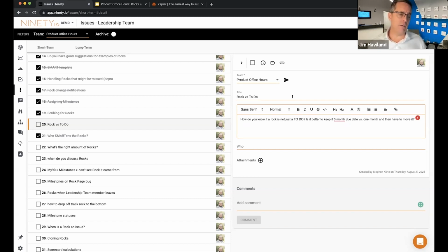So default to a rock if you think it might take too much time, and just mark it done early, and enjoy the rest of your quarter, or take on another small rock. You can take on more rocks during the quarter. I guess we never talked about that, but we do that all the time. We call them mini rocks, not 13-week rocks. If it's going to take more than 2 weeks, it's a mini rock. Just make sure you phased it so you're doing the right thing this quarter. You'll get the scope wrong sometimes, and you'll have to have a conversation about it. It's okay.